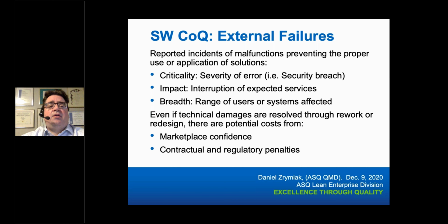And then the impact is how many people would be affected, the breadth as well, the range of users, but also the timing of the interruption. If the interruption is during a low usage period, say on a Sunday night of a long weekend, it doesn't affect as many people as if it were in prime time, or in advance of a major deadline. For those of you who pay taxes, if the system to accept submissions went down 48 hours before the due date, that would affect your ability to complete it in a timely manner.